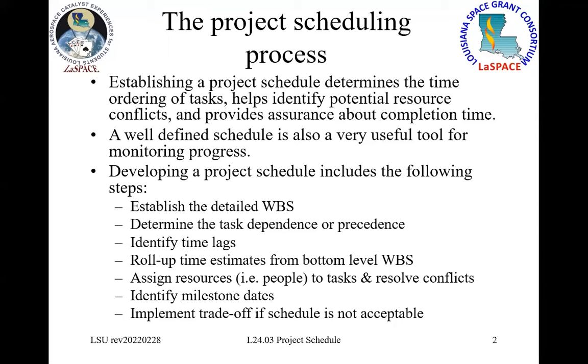A project schedule determines the time ordering of the tasks, and helps identify resources or resource conflicts, i.e. having the same person scheduled to do two different tasks at the same time. It's usually not a good idea. It also gives you some confidence that you can complete your project on time. The schedule is usually a very useful tool for making certain that your project is moving forward on time.